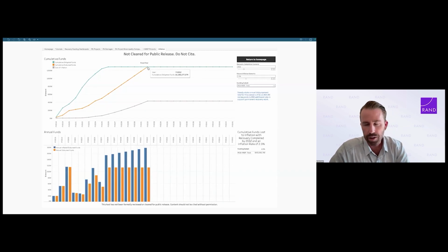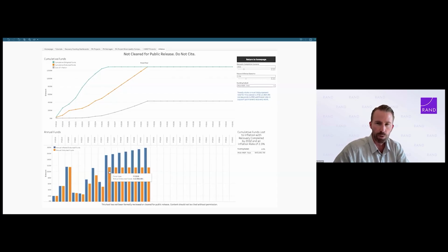All right, two other insights that come out of this. One is that steady state spend rate is 112 million. Sorry, it's somewhat fine print on the side there. So in order to finish by 2032, going forward, we need to maintain at least 112 million per year in disbursements. In order to execute that work, we're going to need 850 construction workers. So, all right, that's our baseline.